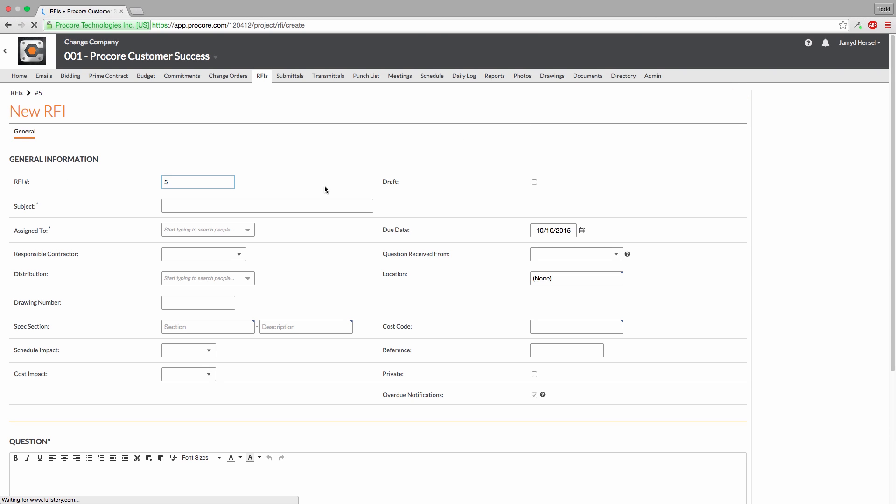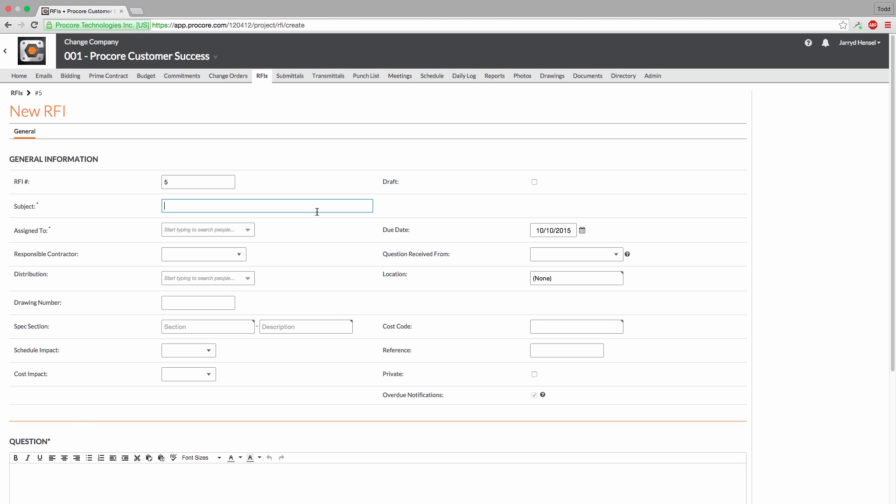On this screen, you can fill in all the information associated with the RFI. Procore requires four fields to be filled out: Subject, Assigned To, Due Date, and Question. To begin, we'll define the RFI subject here.